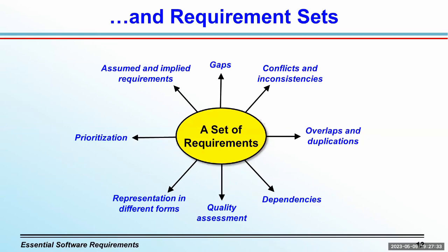It's something that should be assigned to people. They have to have responsibility for identifying risks, evaluating them, selecting mitigation strategies, and being responsible for implementing those mitigation strategies and seeing how well they work. And a part of that is requirements related risks. There are some generic ones like missing a stakeholder, which came up earlier. If you overlook a stakeholder, that certainly is a risk that you have to be concerned about. And then you ask yourself, well, how can we avoid overlooking stakeholders and take appropriate actions?